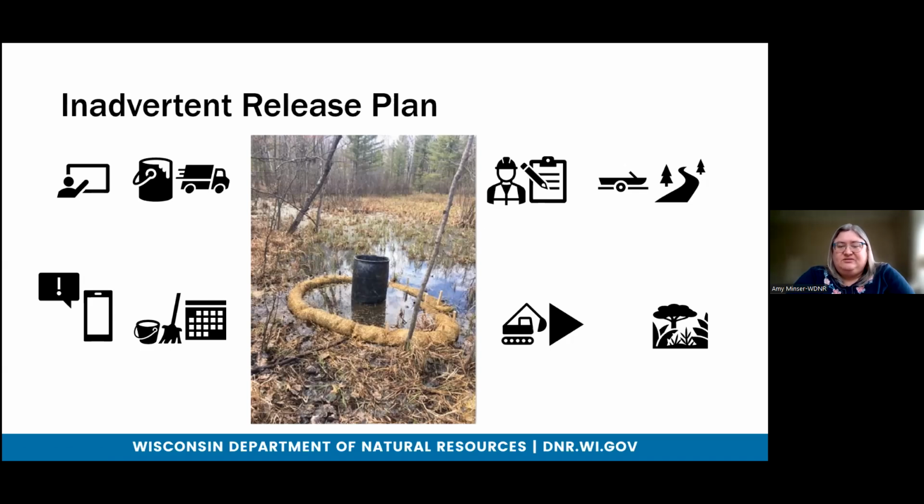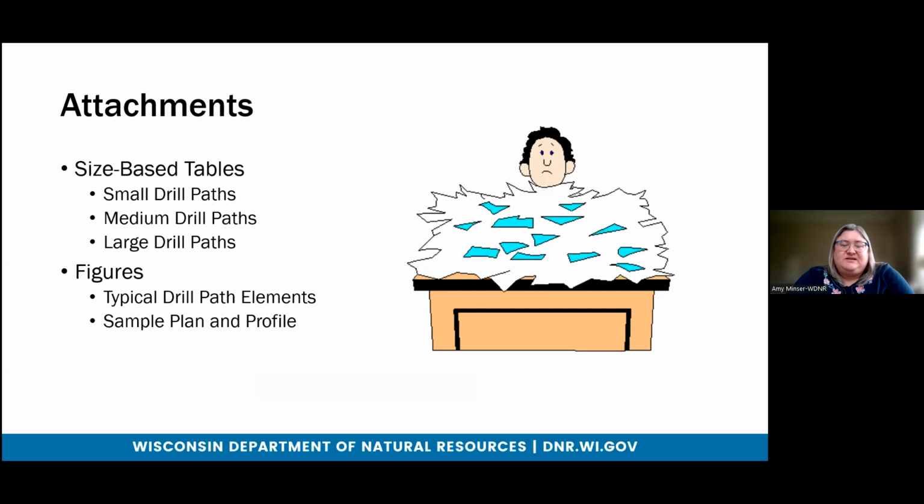Who is going to decide when to start drilling? How are you going to make that decision? And what are the long-term restoration plans? But the basic concept of the inadvertent return plan is to not wait until you have one to make decisions about how you're going to respond.